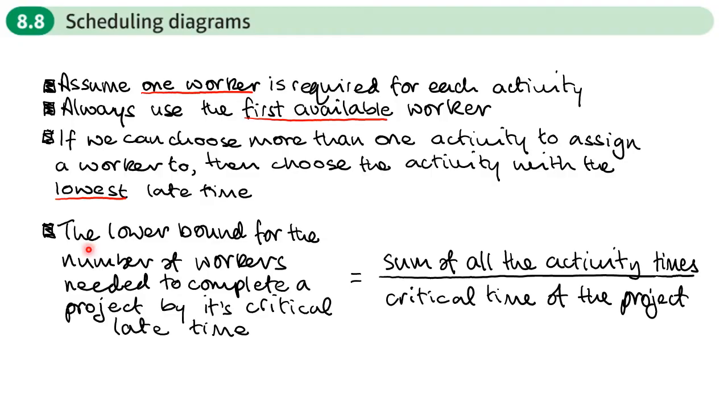Now we can't say for definite what's the minimum number of workers needed to complete a project, but we can work out a lower bound. We can work out the minimum number of workers that the value should be. And if we get that lower bound, we know we've found the minimum number of workers.